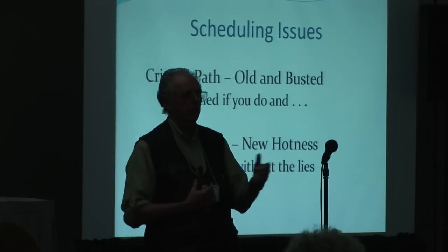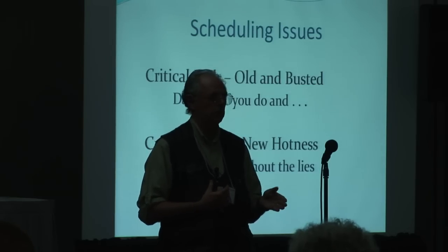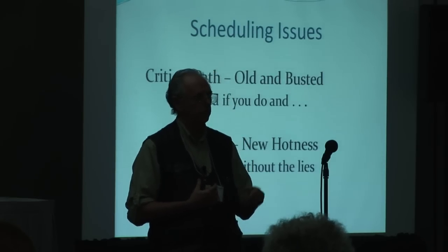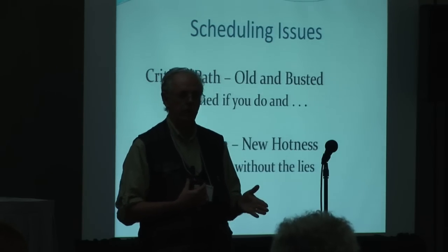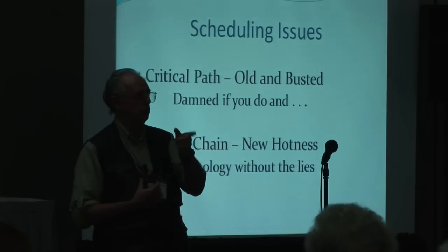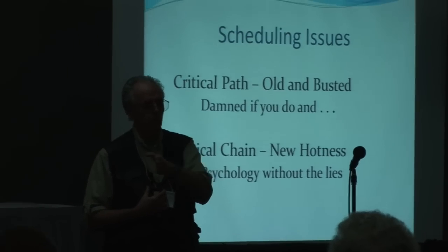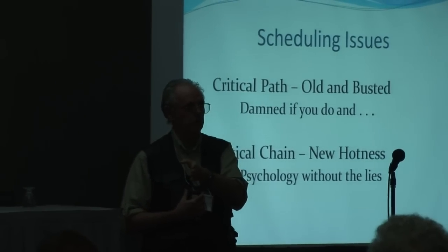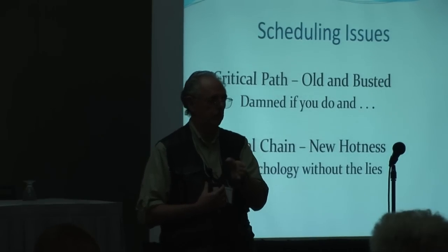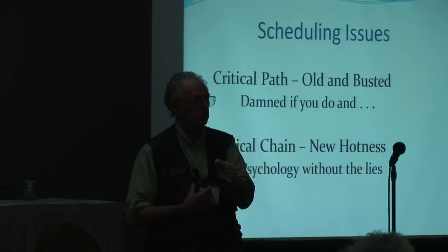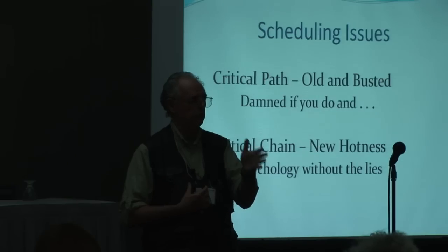So what happens now is when somebody busts a milestone, they realize, I expected it to be done by this time. This is what I committed to. I didn't make it. So now there isn't this psychological thing saying, I've got time. There's this sense of urgency to get it done quicker. But nobody panics because we have the pad down here. And what you do is you manage that pad. You're saying, okay, at certain times you should be in certain places in this pad, and if you go over it, that warns you that you're actually taking up more time than you anticipated, and you need to maybe rethink moving your milestones, or take some other action. But you don't panic when you miss one or two milestones, because you just watch the pad. So long as you're under where you expect to be in the pad, you just keep moving forward.